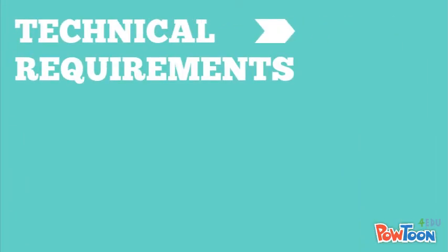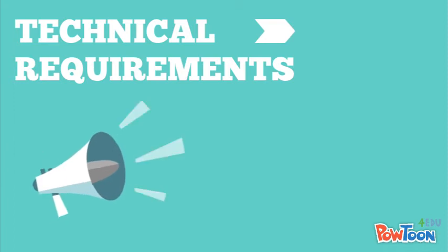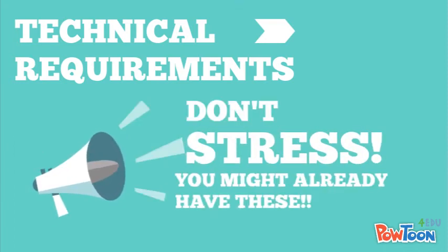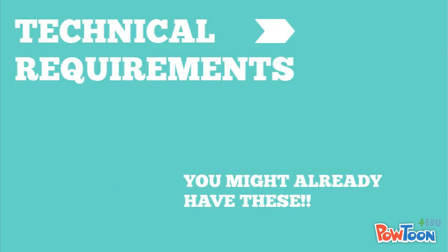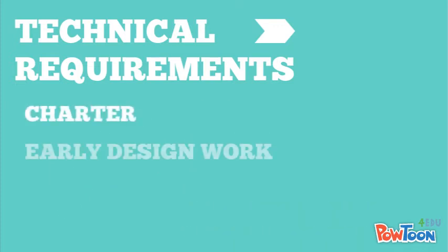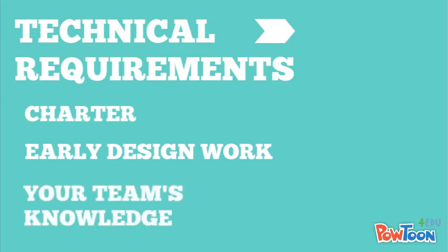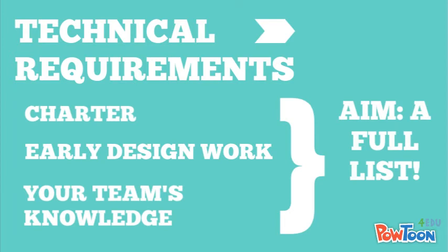The fourth element are the technical requirements. Some might already be listed in the project charter in the high-level requirements, or there might have been some early design work done which might list some as well. Whatever the source, be it the charter, design work, or the expertise of the team members, now is the time to put together a full list.